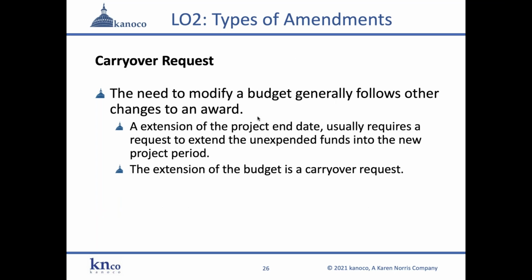Now, a carryover request is typically necessary when there is an extension of a project end date. And the need to modify your budget typically follows other amendments or modifications to an award. So in this particular case with the project end date, the extension of the end date would usually require a concurrent request to extend the unexpended funds into the new project period. The extension of the end date isn't going to do you any good unless you have access to the funds.